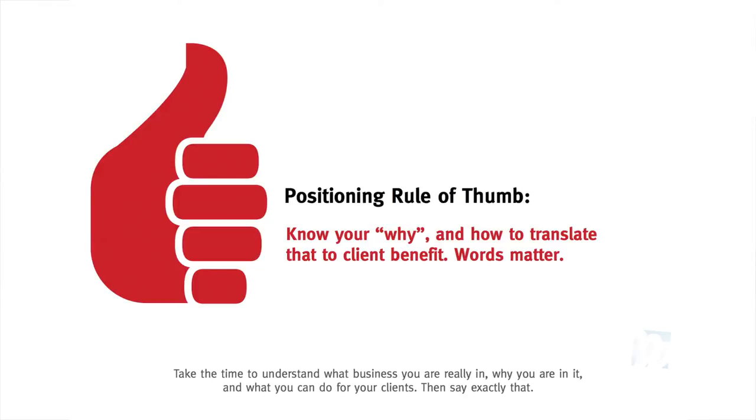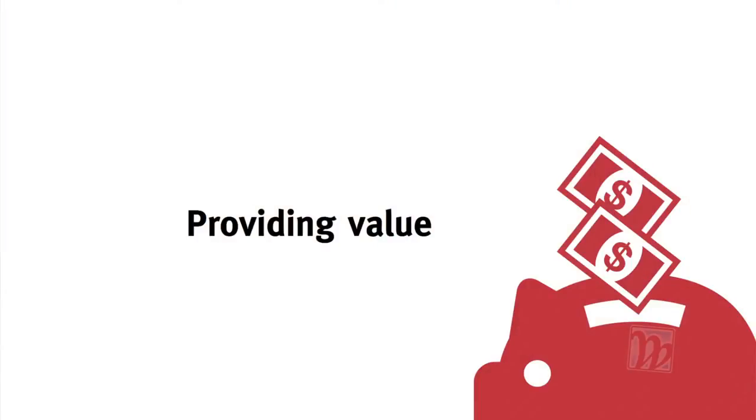Keep looking at your whole list of projects. That's the basic takeaway here. And charge for project management, at least 3%, sometimes as high as 25%, depending on what kind of projects you manage. If you're a subcontractor and just doing development, there's typically not a lot of project management. Sometimes there's tons of project management and it eventually ends up evening out in the wash, but make sure you charge for that time.